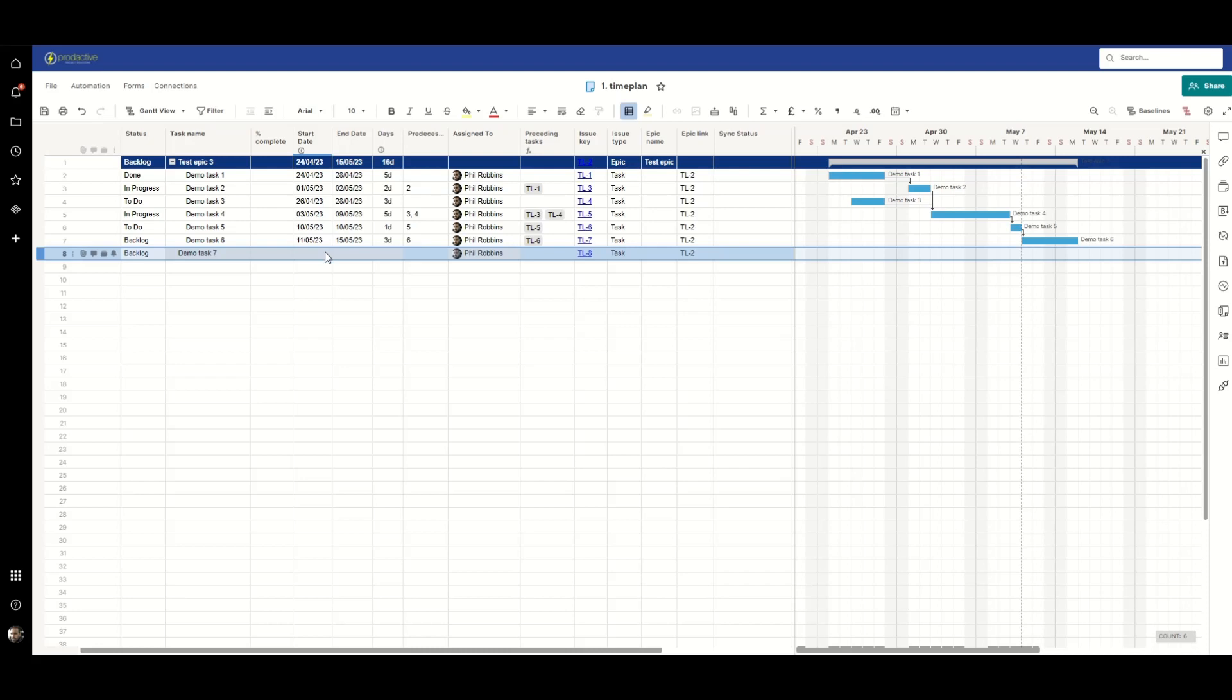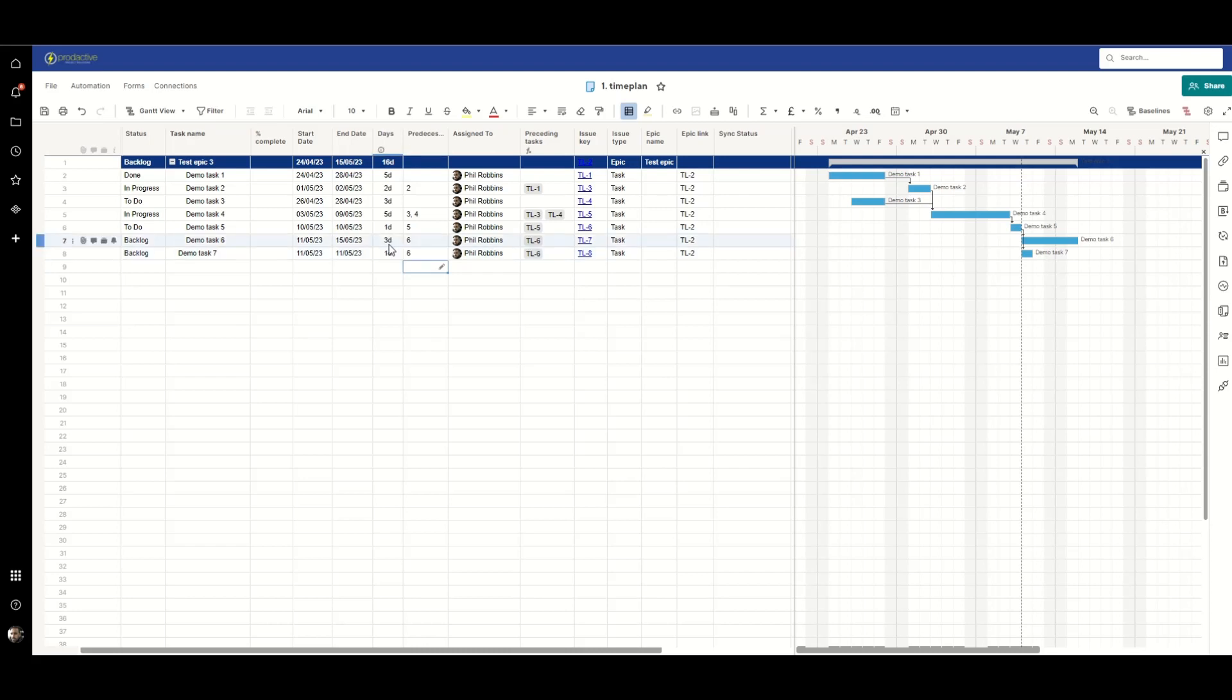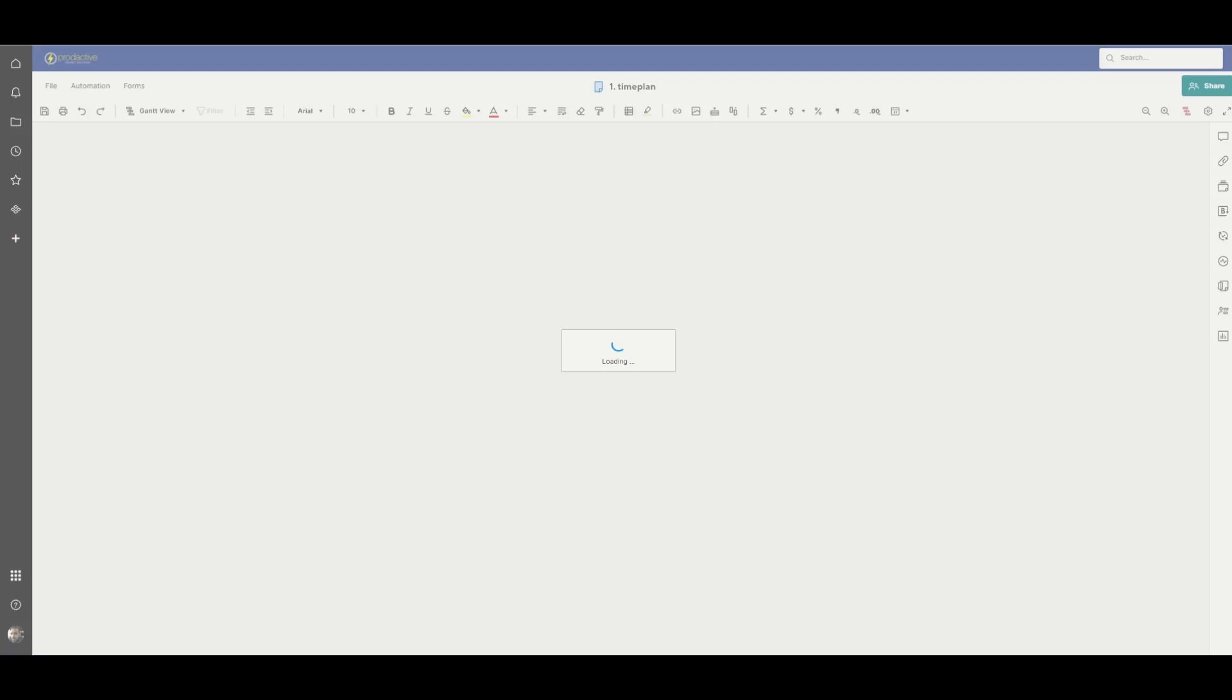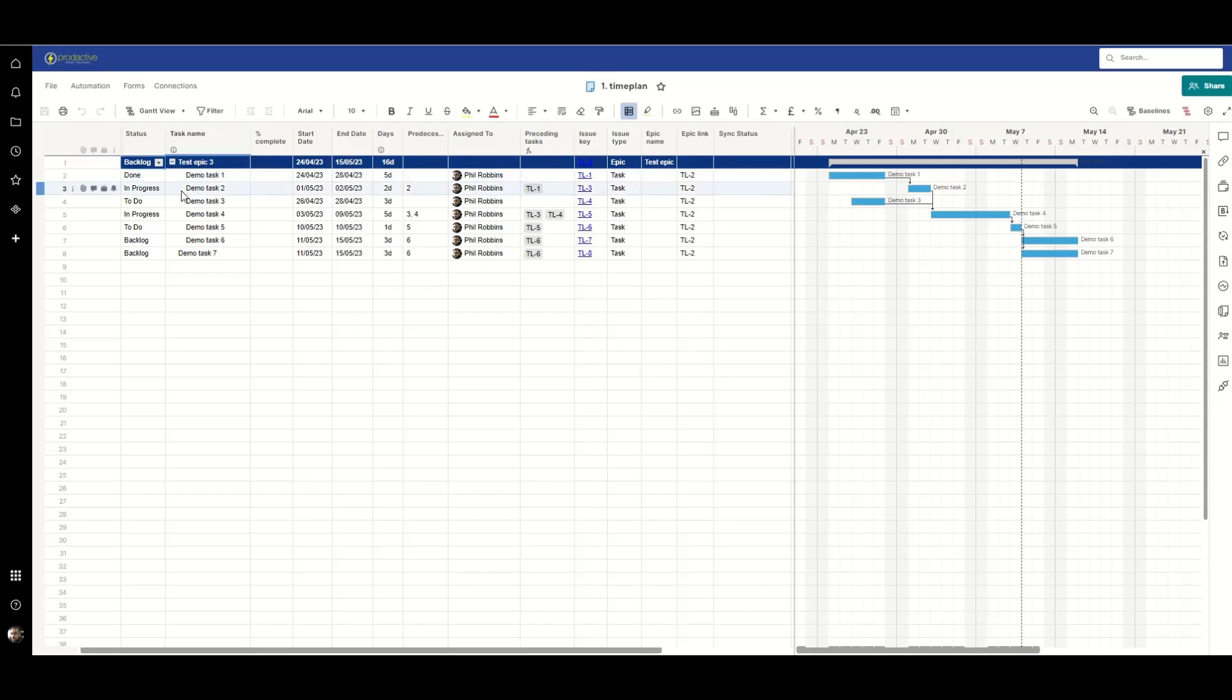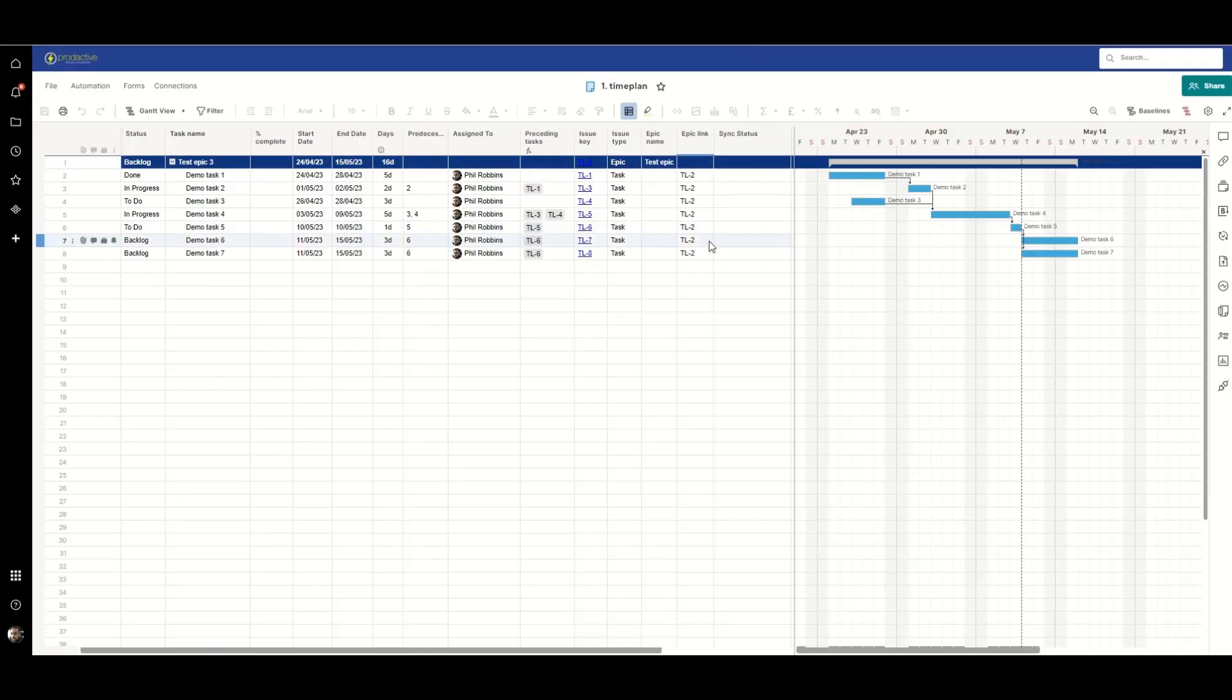What I do need to say is that there is you know I don't have a start date or an end date but again this is up to me now to really plan this new task that's come from Jira into the program so I could say hey that one that one's going to go in parallel with the task we created previously so that one's also going to have a predecessor of six let's say it's going to take the same length of time as well so that will sync back into Jira and let's just give it another refresh just waiting for it to indent because what it should be doing is you'll be reading the EPIC link and saying hey well this is part of there we go one second yep so it said I'm part of the EPIC link TL2 that means that I should be nested under this.